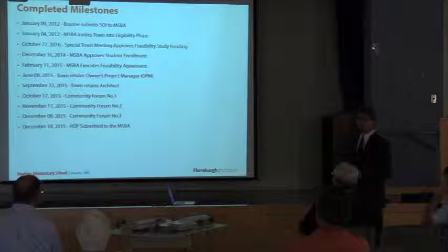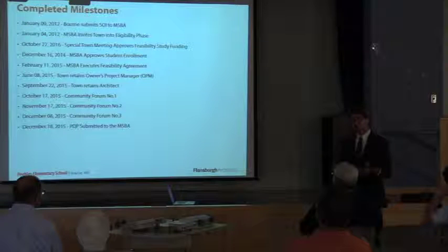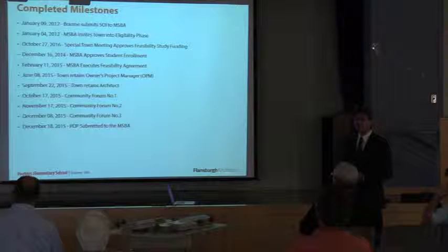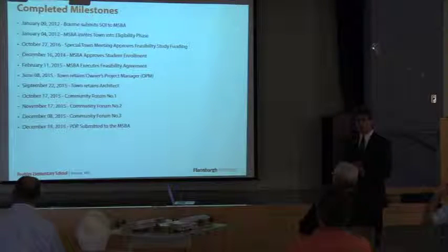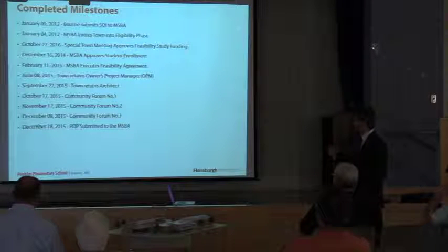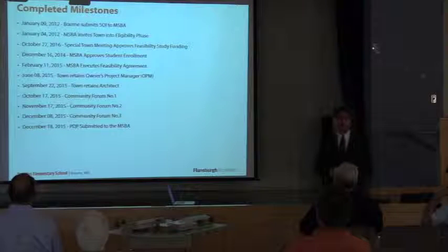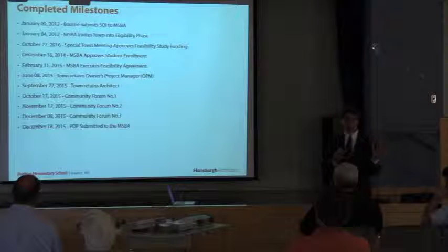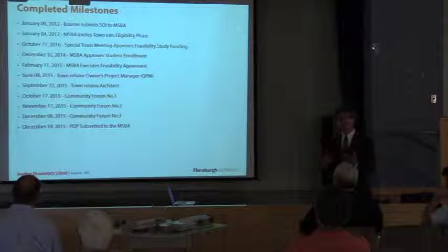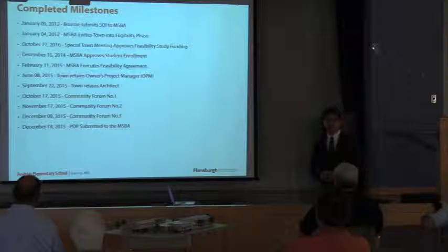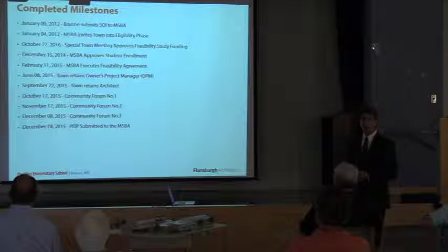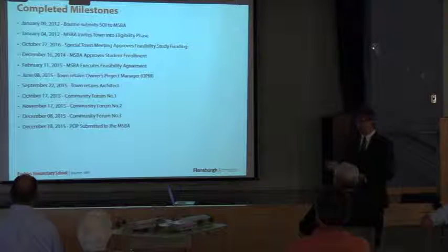Some of the completed milestones really start back in 2012. So it really does take a long time to get to this point. It's a very deliberate process that the MSBA has to make sure that the community is really investigating all of the options. Starting in 2012, the Town of Bourne submitted the statement of interest. That was a document that the selectmen, the school committee, and the superintendent had to vote on, sign, and submit to the state, which stated that there is a need to address the Peebles School. And since 2012, there have been many, many steps along the way leading up to the design that we'll be presenting tonight.